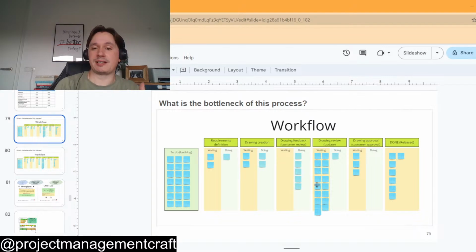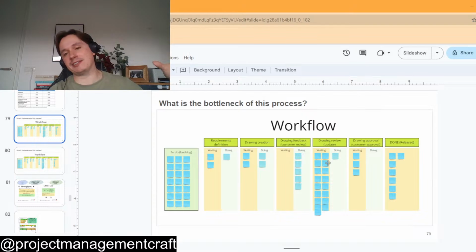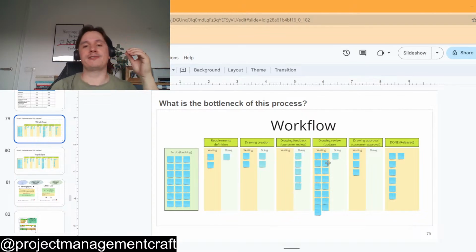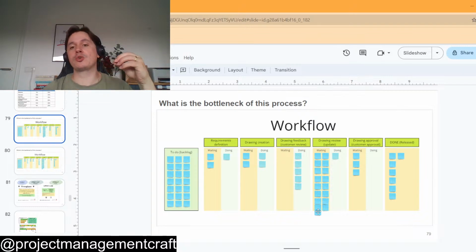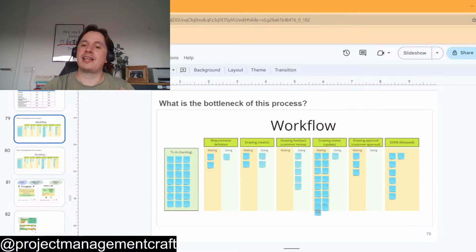In this case, the system is already clogged because there are so many items to be done. If you get a new drawing to be reviewed and it follows the normal system, your lead time will jump from, I don't know, maybe a week to months, just because of the way you're doing that. So there's a huge amount of waste that you can identify there.